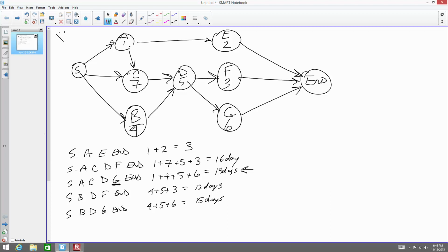That one. The old classic system is considered design, bid, and build. That's what I grew up on. Engineer designs it, you bid it out, and a contractor bids it. The new thing that is becoming more and more popular is what they refer to as design build. You actually are the designer and the contractor on the same team, one team.